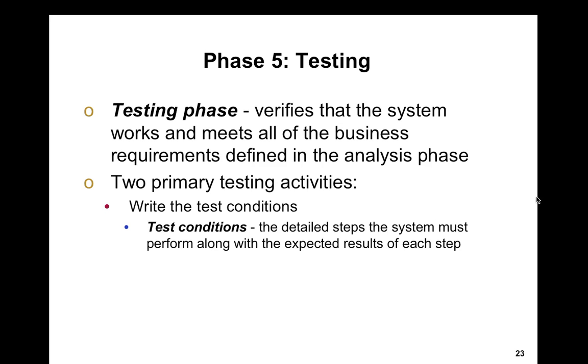So the theme being, if you put testing at the end, there's a high likelihood, regardless of how well you planned it, your project's going to run late, and it's going to be over budget. You're not going to have any money left, and you're not going to have any time left to test. Bottom line. And testing is probably the most important part of the implementation. Because if you have a system that doesn't work, why use it? You spent a year and a half, two years developing the system, and it doesn't even work. The customer's not going to like it. Your company's not going to like it.